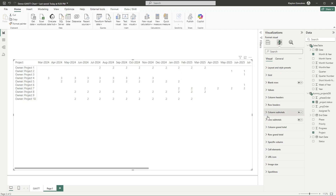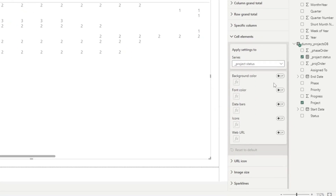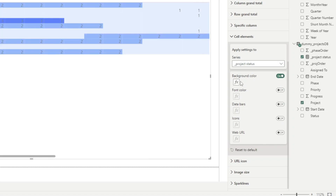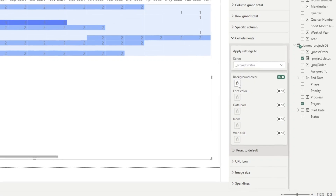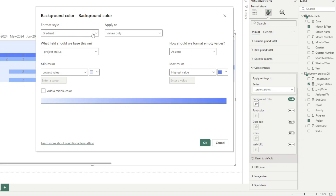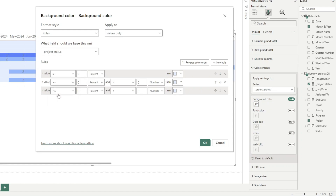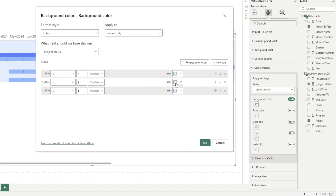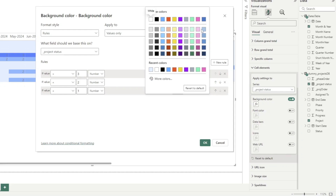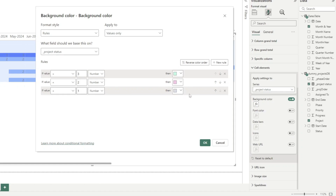Now let's handle the values. Under cell elements, we'll add conditional formatting for the background. Change the type from gradient to rules. We'll add three rules: if the value equals 3, the project is completed — assign green. If the value equals 2, the project is underway — assign pink. If the value equals 1, the project hasn't started yet — assign gray.